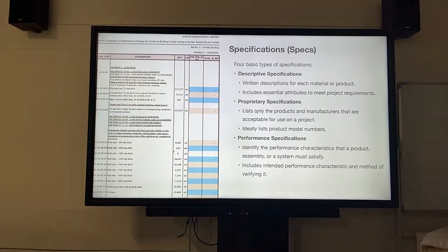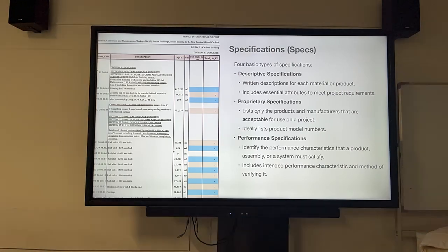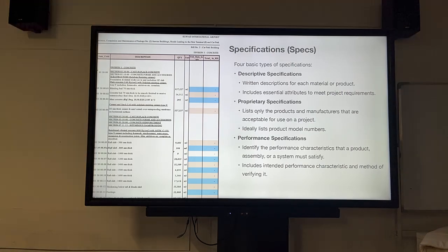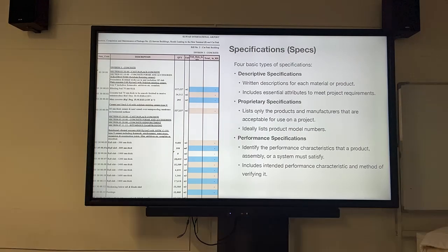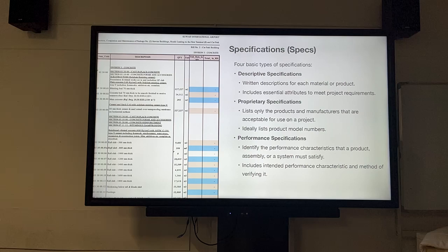Public projects, that becomes a legal issue, especially if I say, for example, I only want elevators from Otis. This is considered monopoly, and I'm singling out one versus another. So I'm favoring one company as opposed to another. So you can't do that, especially in public projects.